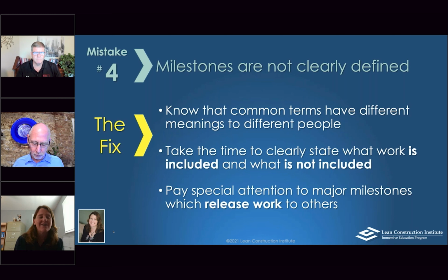What I get to talk about for the next few slides are milestones, and then those milestones moving into the phase pull plan. And if you think about your master plan, your milestone schedule, whatever you call it, basically that first schedule that's put together at the beginning of any project, it sets the foundation for all of the lean and Last Planner tools that we're going to implement going forward. So it's key, even if the last planners themselves are not a part of putting that milestone plan together.